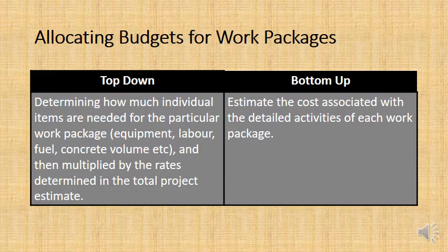So you say, well, I need to use the crane for 200 hours to install windows, so I multiply 200 by 250, so that's what? That's $50,000.